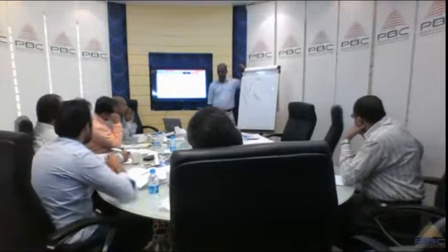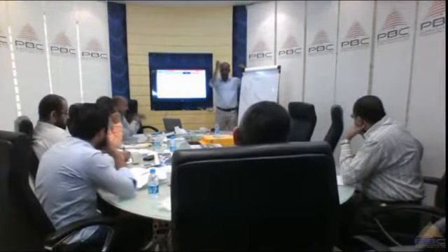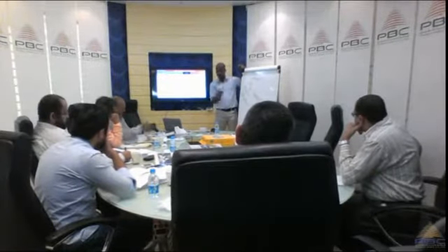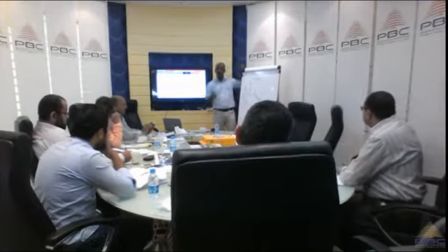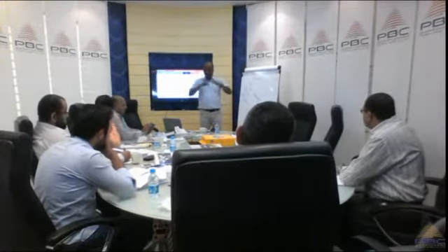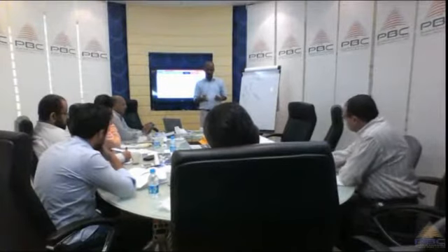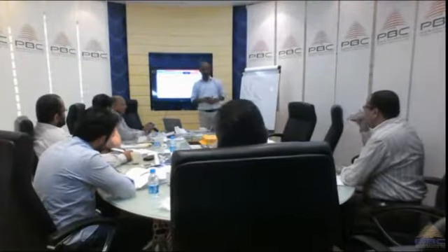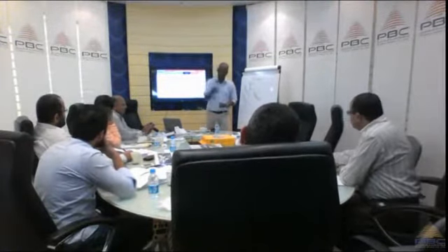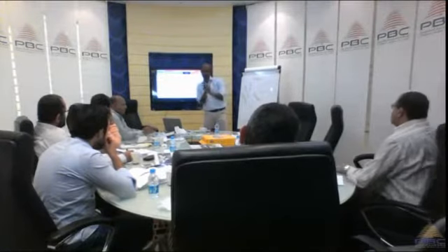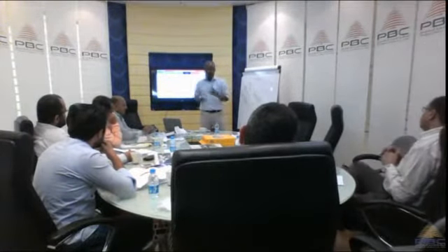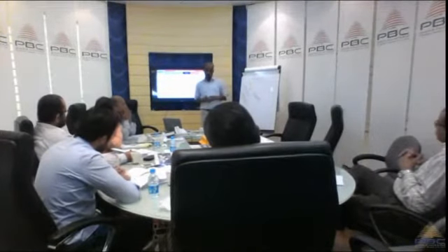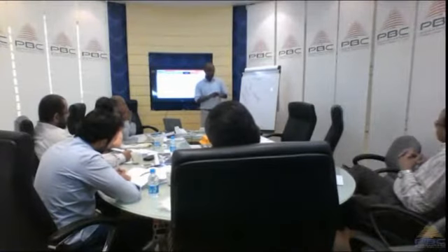Okay, so control is all about variance analysis, because we might not have any variance or deviation, or maybe the deviation or the variance is within the accepted limits. Because if the variance is within the accepted limits, we don't have to go and fix anything. If we go in with any minor deviation and say, okay, there's a variance here, we need to correct things, that's not wise project management.